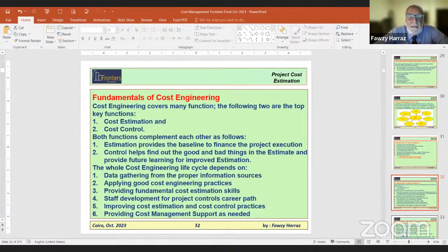Underestimation is a very serious catastrophe. You know why? I tell you why. Because, as I said, the management decision is based on the estimate. The economics is based on the estimate. So if it is underestimated, it can look more feasible than it is in reality. So the people say, this is a magnificent project, let's proceed. And then ultimately, when you start execution, you'll find out that the estimate was under by 20%. And the real figure, the correct figure, if you pass it through the economics, will say it's not economical, it's not viable, it's not profitable.